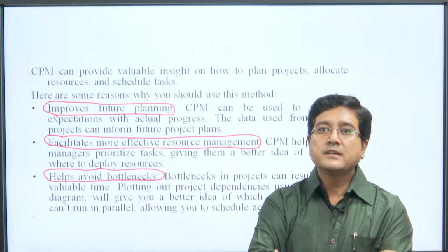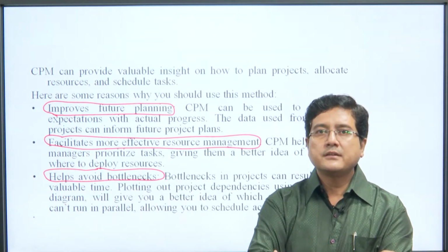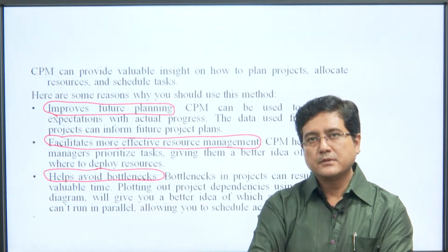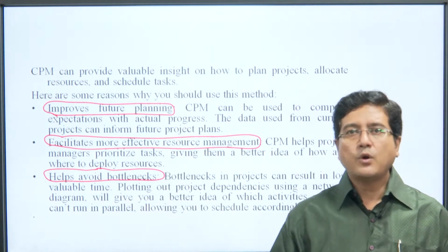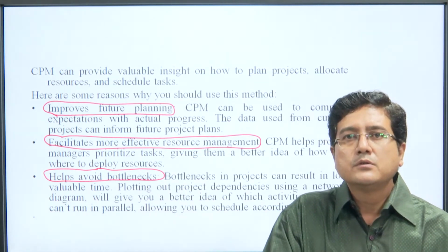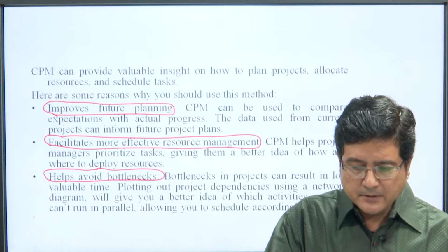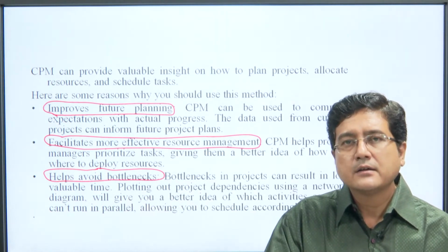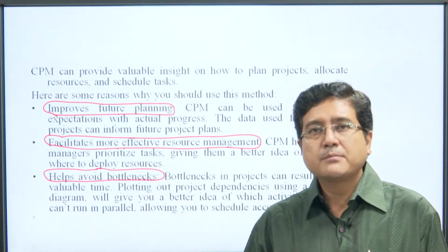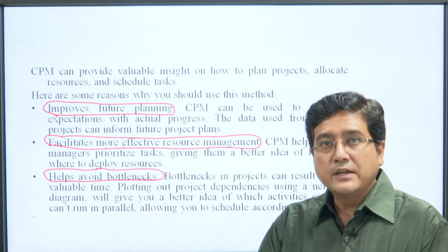The project manager gets worried, and due to this worry, sometimes quality control is hampered. The company puts all its effort into completing the project on time or before time to save themselves from any kind of penalty, because in some countries, even in India, it is up to the contract between the client and the project team that if you do not complete the project at the proper time, you have to pay a financial penalty.